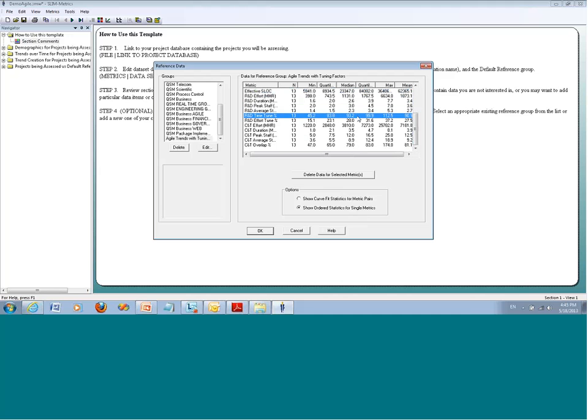And you can see here, it just so happens that we use the median value in some of the algorithms, so that's the value that we'll look at here. But the time tuning was 93% and the effort tuning was 28%. Also, the overlap was almost 80%.